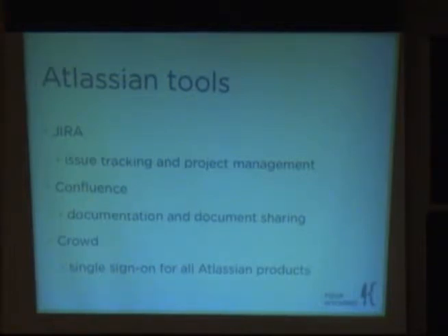We are a Scrum shop. We operate every project according to Agile methodology. So we have created certain types of tasks that are not tasks, they're not bugs, they're not new feature requests, they're Scrum stories. So we file all of the Scrum stories, user stories, into Jira. The client goes in and prioritizes everything for us. They're the product owner, that's the product backlog.